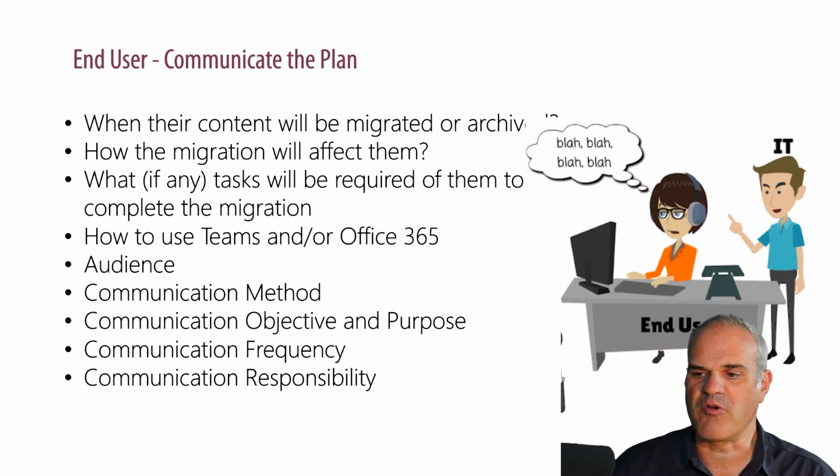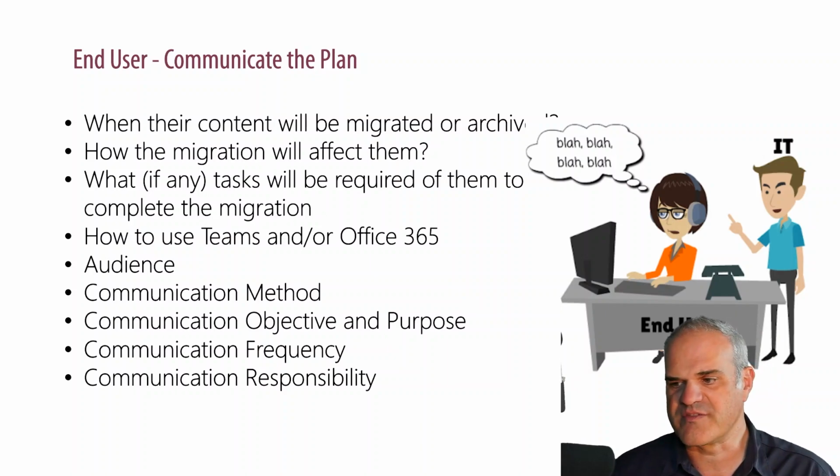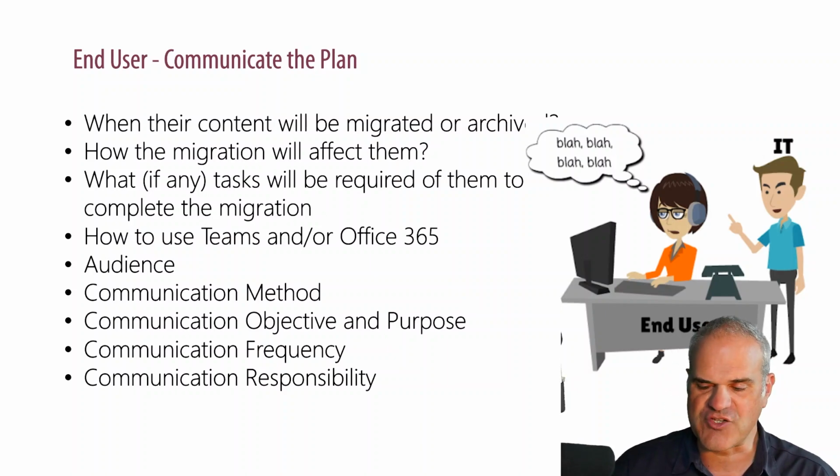So think about all the communication methods, frequency, who is responsible, what is the purpose of each message, and which channel you would like to use to share all the next steps and improvements, but also maybe you want to communicate a delay or something which impacts in a more negative way.